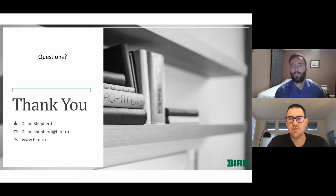Yeah, awesome. So we got a couple other questions here from the group. What is the biggest pain point when dealing with manufacturing and supplier data? I think some are hesitant to share their information to the level that is valuable for the construction process. Some stuff you get just a plain block, and other ones you can get all the connection points and some good value there. It just is challenging though. A lot of times some of that stuff doesn't get picked until the very end, so you are just using a placeholder, and then you can pull the trigger on a piece of equipment and suddenly it doesn't fit in your room.